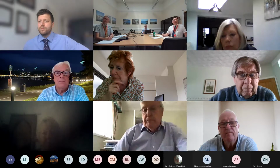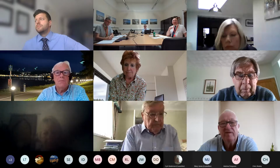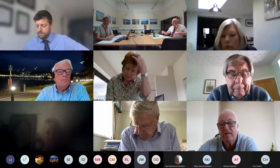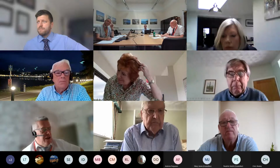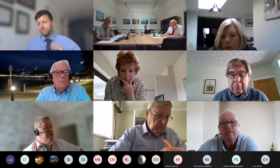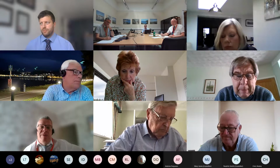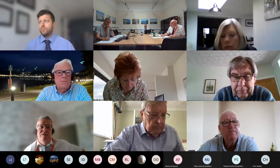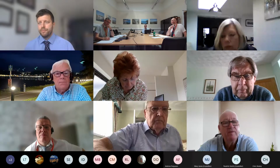Okay, thank you. I've got no other hands up to speak, so perhaps Jonathan, and then we will come back perhaps for Liam and Highways. Jonathan. Thank you, Chair. In response to Councillor Evans, condition 11 on the report states that it is a pre-commencement condition for the 4.5 metre width. So as this is pre-commencement, this would have to be achieved before the development could commence. Thank you, Chair. Right, that clears up a few questions then.